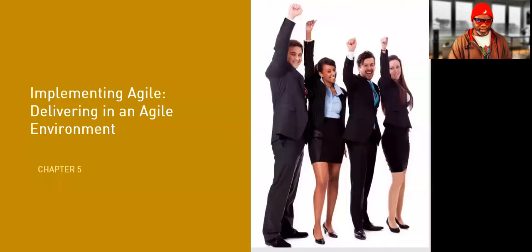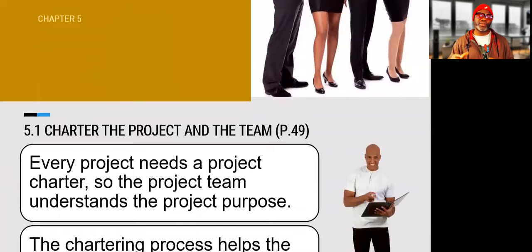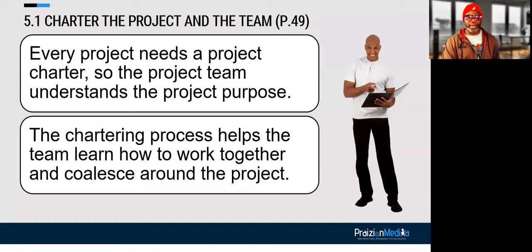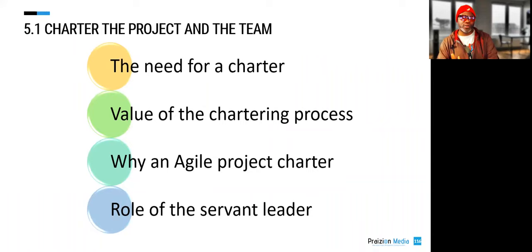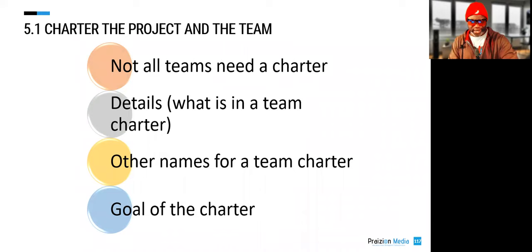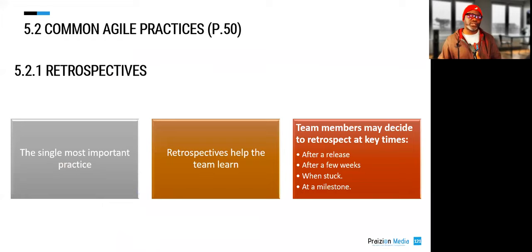The next chapter is about implementing Agile and delivering in an Agile environment. The big thing is the charter — no charter, no project. Every Agile project needs a project charter so that the vision can be crafted and there can be direction. There's also something we call chartering: creating a team charter. Teams that have been working together for a long time may not need a new team charter every project, but where the team has not worked together, a charter could help. We call it a social contract, a team contract, or a team agreement.